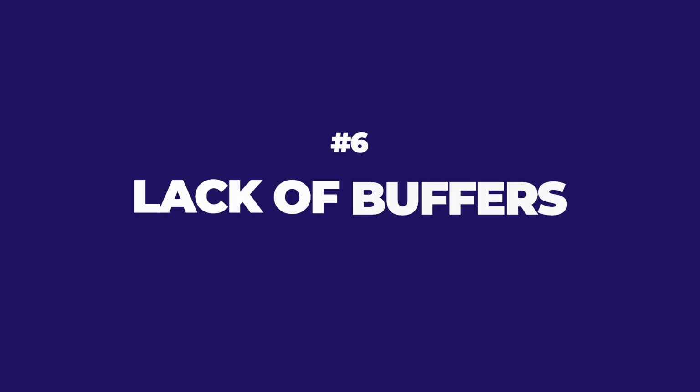6, a lack of buffers. This can become a system constraint because if you don't have buffers at the end, you will be encouraged to trade stack. Once you trade stack or trade burden, you will enter a productivity spiral. Your overall duration will extend and it will become your most limiting factor. Now let's talk about 3 more. The most common constraints will be these 3.